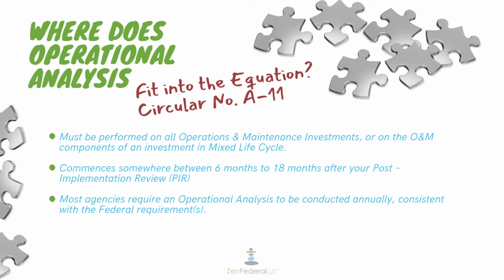An operational analysis needs to be performed at least annually for any kind of investment that is considered in operations and maintenance or in mixed life cycle, where some component of the investment is in operations and maintenance and other components may be in development, modernization, or enhancements. You would start doing an operational analysis annually 6 to 18 months after a post-implementation review, where you've built or acquired something new and rolled it out and put it into service.